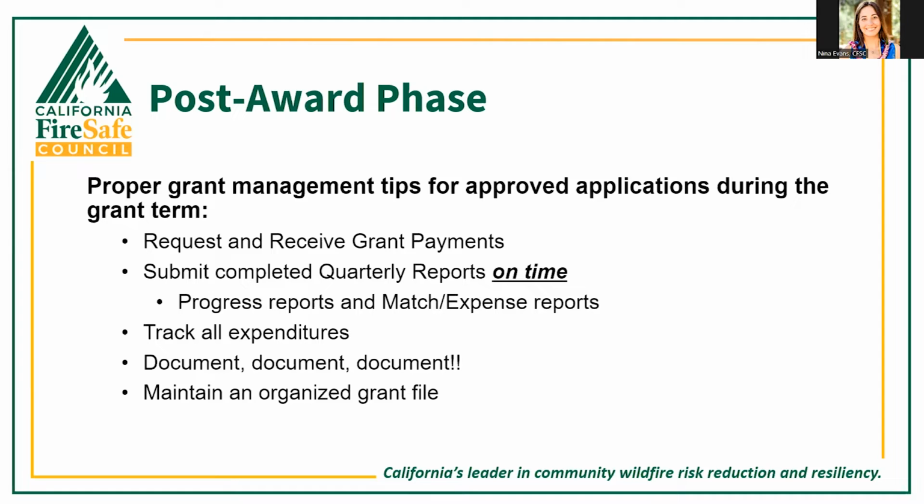In addition, grantees are expected to maintain organized, detailed, and complete grant files. Files should include all documentation relating to the grant, including source documentation for all expenditures. Source documentation includes, but is not limited to, invoices, receipts, timesheets, contracts, etc. Grant documents should be organized by each quarter as you submit them.